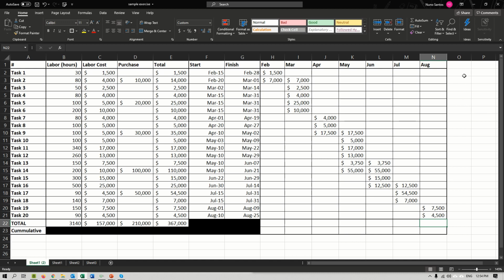Now if you want to check very quickly, for example, if you made a mistake, what you can do is simply do the sum of this entire column. Right, then you go here to the formula Tn and you take out the total that is here. Okay, and if you get zeros, that means you distributed everything at least in totals, it's correct. There you go, so it's 100% correct in terms of distribution numbers.